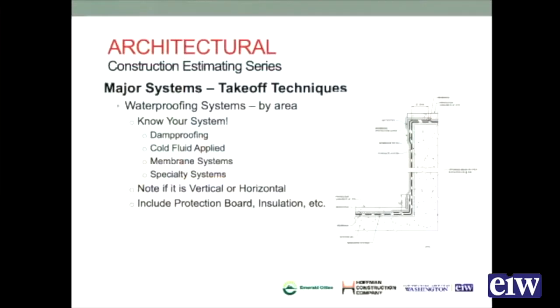If they don't, it may be in your scope, because sometimes those items are actually spec'd out in the waterproofing specification. So it may be someplace where you need to ask the question. And certainly, even if it's in the concrete spec, you need to understand how that coordination is going to work, because they have to form a concrete slab.